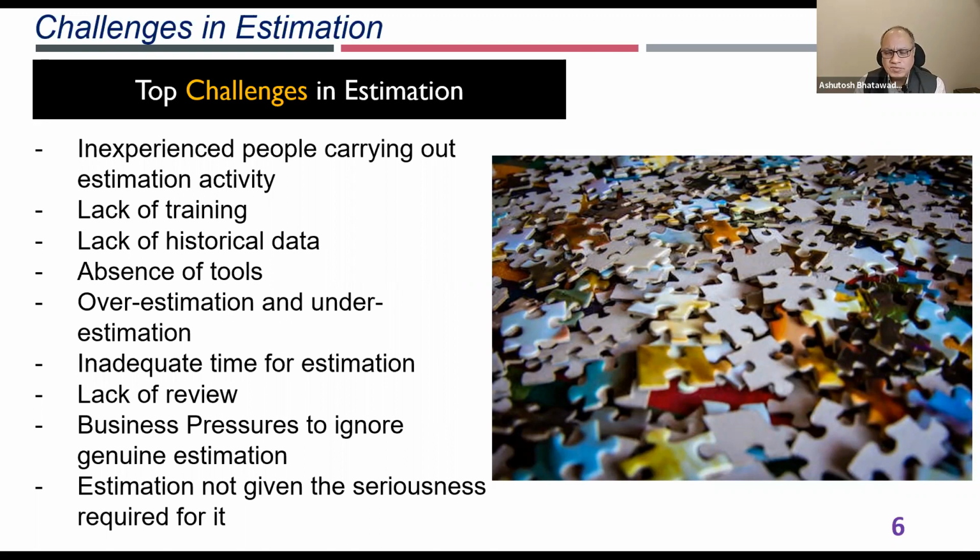So in a bank, if I want to withdraw a huge amount of cash, one person will not authorize that, although the balance might be there in my account. One person will be the maker, who will say that this is a request I've received from Ashutosh. Another person, maybe some senior person who has the authority for those approvals, will approve it, right? So similarly, in estimation also, we should have a maker-checker process. Someone will initiate the request, someone will prepare the estimation, and someone else is going to approve that estimation at the end of the day.